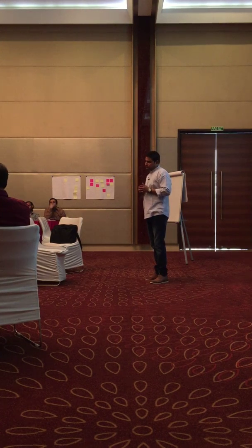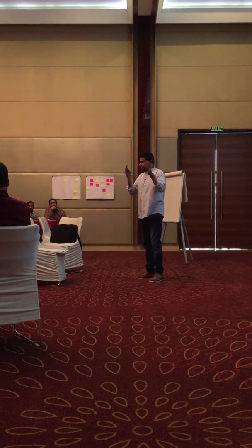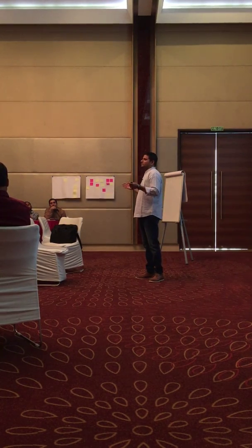Yes, please. First day. So in that way, like you're saying 10 days, effective 10 days. Now, there will be some hours, right? But the actual development work will not start on day one. It depends on the length of the sprint. Again, unfortunately, we need to keep it for the sprint planning ceremony. If your sprint is 30 days, 8 hours is the sprint planning time. So that means pretty much the first day you will spend on analyzing, understanding, estimating all these things and breaking down into tasks. From day 2 onwards, your development and all will start.